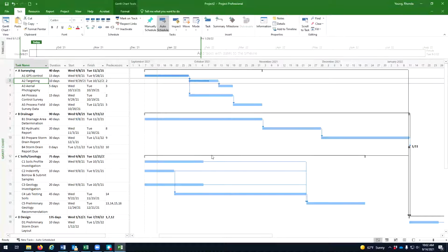A lot of contracts with agencies, particularly public agencies, have what we call liquidated damages. So if your contract goes over the final date, you as the contractor actually have to pay the client money. But on the other side, there can also be incentives. This happens a lot in transportation, where there's a pretty big impact to the system when things are under construction, so the contractor can get bonuses for finishing early. Managing the time duration of the project is obviously important for the bottom line of construction companies.